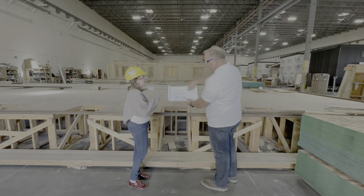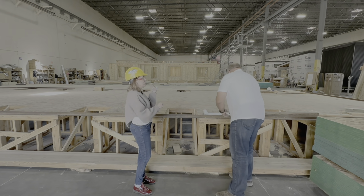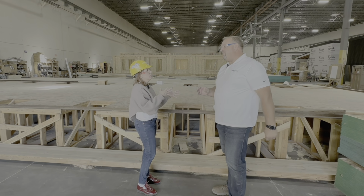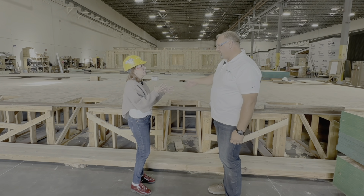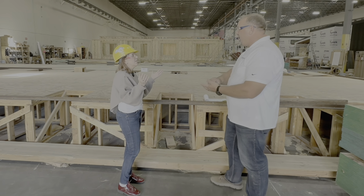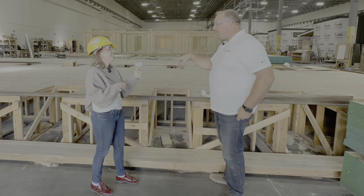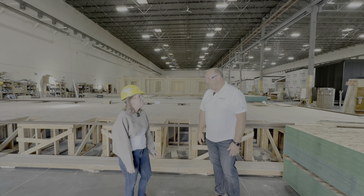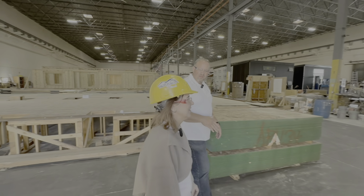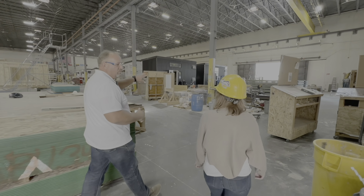I have to ask, so you have all this here. After somebody's finished, is there somebody that goes behind that person to make sure that they did what they were supposed to? We have a 36-point quality assurance process. What does that mean? It means that when they finish, before they sheet it, they do a checklist. After they sheet it, they do a checklist. Who does the checklist then? We have quality control people. All of our team leads are responsible to do those checklists. So we have all of our leads do their own quality control. And then we have a third party that comes in and does an additional check at one stage in the rough and one stage in the back end.